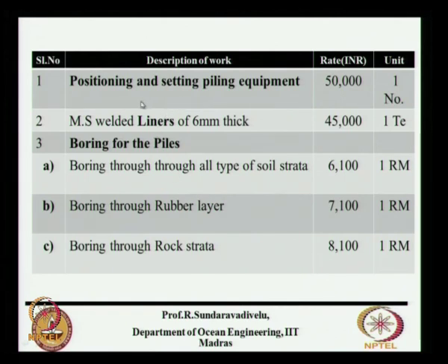So for a typical berthing structure, if you have about 300 piles, let us say, for each pile when they go and start pitching the liner, for each number we have to give a rate. So here we have given the serial number, the description of the work, what is the rate in Indian rupees and the unit in which it is measured. So here it is in number.